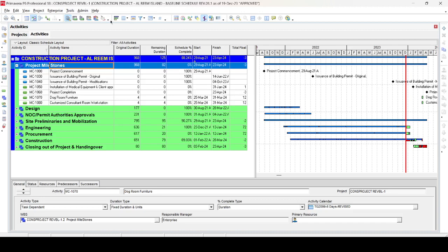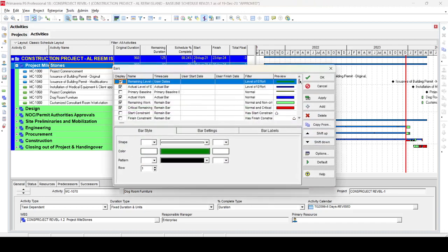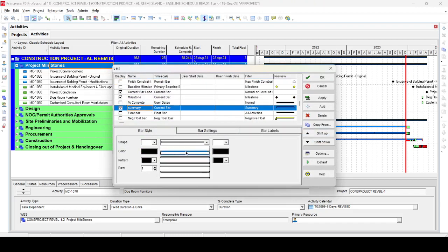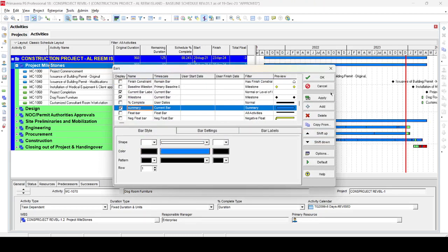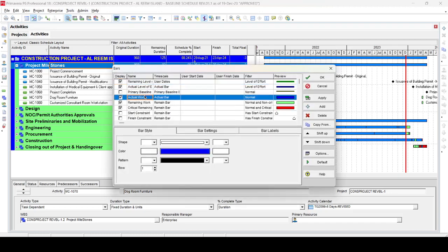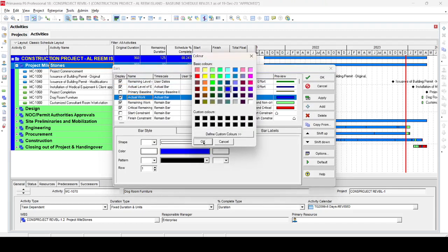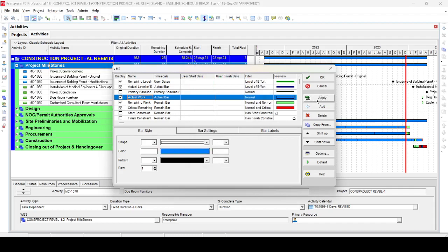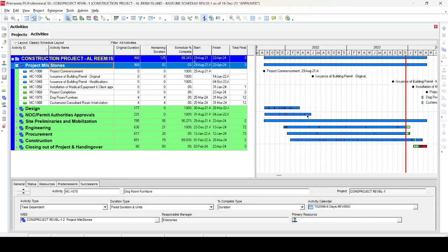If you want to improve the bar further, go again to the Bar dialog box, select the Summary bar, and increase the thickness of the bar to maximum, then press Apply. You may notice some black dots in the bar — these are actual work bars. To remove them, go to the Actual Works bar settings, select the same color as the summary bar, press OK and then Apply. You can also hide the border of the bars.